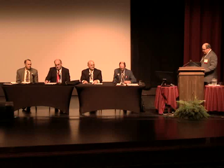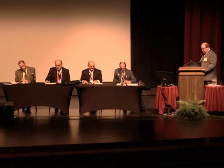KPI entries begin on day one of the contracts. There is no grace period, so the contractor must be staffed and equipped to begin operations immediately. But department personnel should work with the contractor to ensure that the contractor is aware of the more common routine maintenance issues that may be encountered to get his operation started off right. Local department personnel are aware of work histories that have been set on past contracts that were appropriate to address our needs.